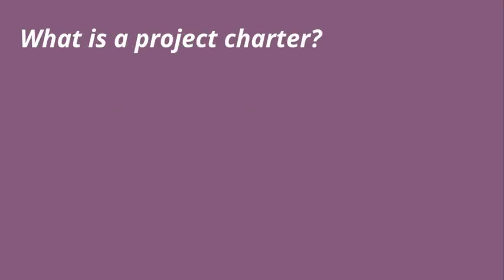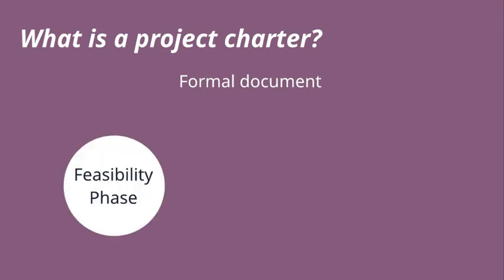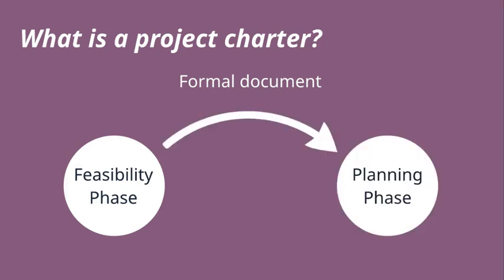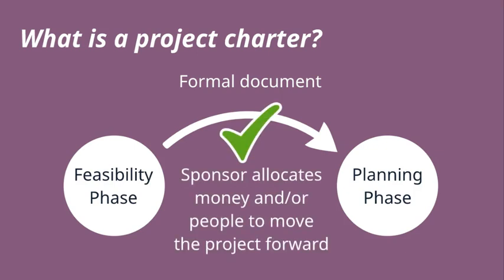So what on earth is a project charter? Well, this is project management speak for a formal document which is used to approve a project moving from the feasibility phase into the planning phase. It allows the project sponsor to allocate money and/or people to the project. It's similar to a business case, but it covers more than just financial aspects.